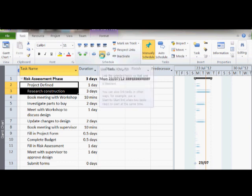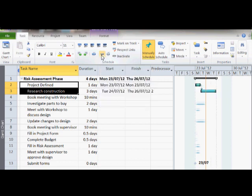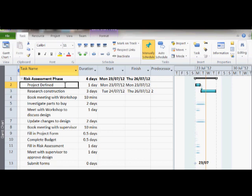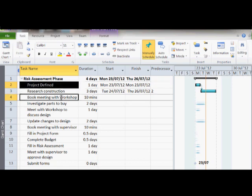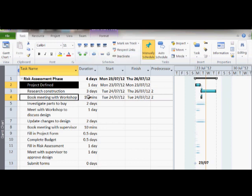This is done by highlighting the tasks and clicking on the link button. Some tasks can be completed in parallel with other tasks. You use the shift key to select tasks that are in order, and you use the alt key to select tasks that are not adjacent to each other.